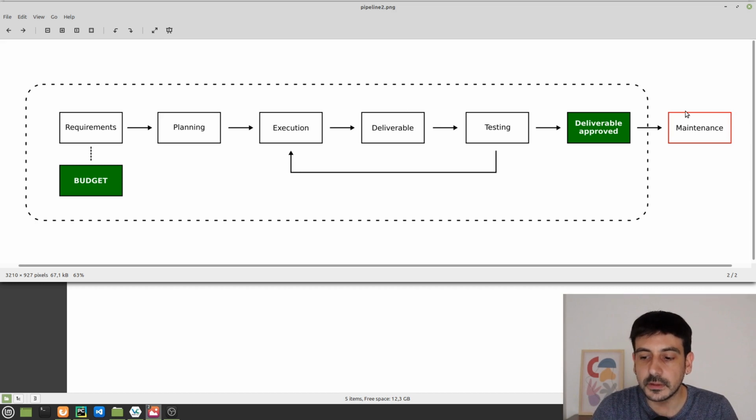When it comes to the maintenance, there's usually a discussion, or sometimes there are issues because the client considers that you need to fix something, but you, the developer, the freelancer, someone who is working on the project, consider that that's not something to be fixed, but that's more like a new feature for the project. Sometimes there are discussions around what is considered maintenance or not.